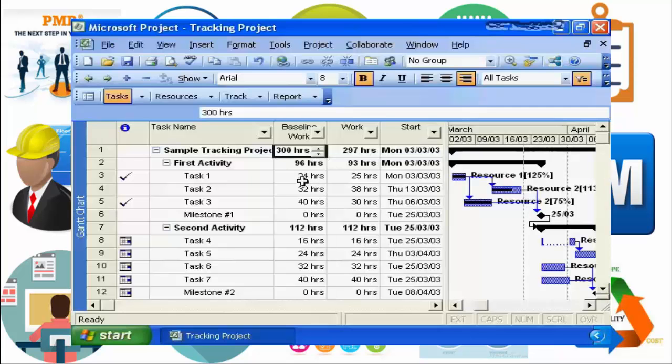If you remember back to when we were completing our original plan in Microsoft Project, the last thing we did after the plan was complete is we saved the baseline. At that time I mentioned the baseline was a series of read-only data spaces that preserved the original plan information. Now we're seeing some of that baseline information brought into play. We're showing the baseline work. This is our original plan information, where the work field is the actual details that we're delivering the project to. And you can see there's variations.